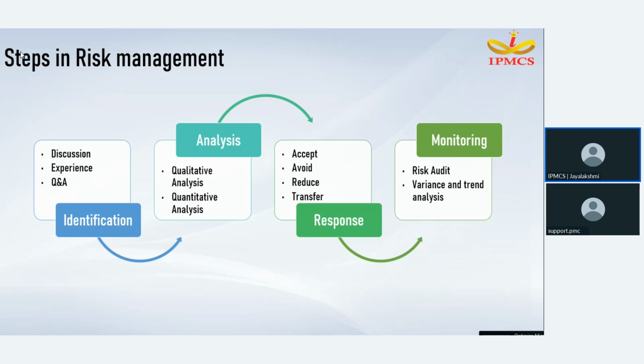We can develop Q&A questions that can be distributed among the locals, especially. The questions can be like, how long does it rain in this area, or how many years ago did the last landslide occur? That will help the local people to answer more easily, and we will be able to identify and prioritize the risk more easily.